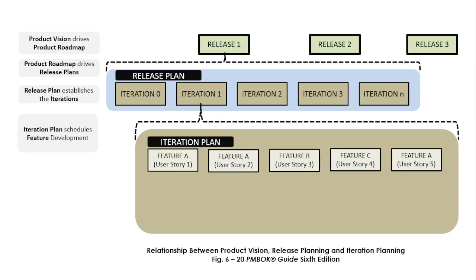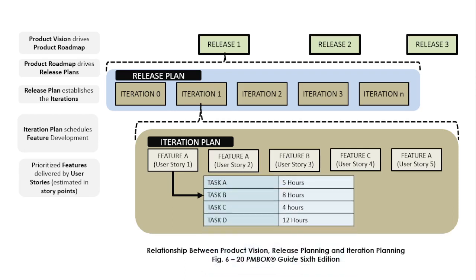In the world of Scrum, we call it a sprint plan. We do know that features contain user stories, so in each feature set we have user stories. Under that level, this is where we begin talking about the individualized work that team members do, because not everyone needs to decompose their work into hours or into tasks. User stories are more prevalent in the world of Agile. You very rarely see the task component in mature teams that have already determined in their heads whether they can complete the work within an iteration. But some people still go down to the task level.